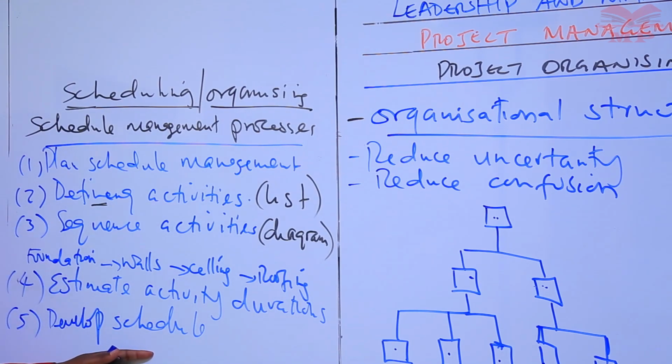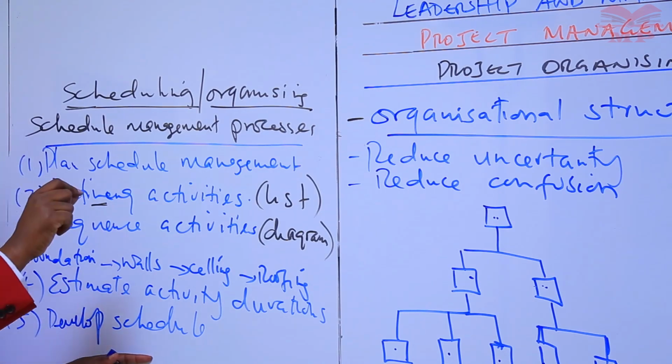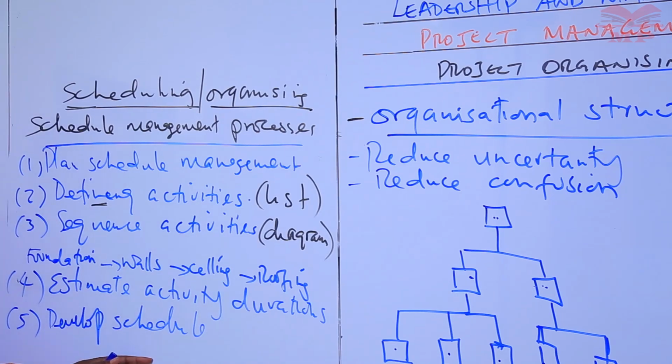And at a minimum, candidates, the project schedule indicates a planned start date and a planned finish date for each activity. And if resource planning is done at an earlier stage, the project schedule remains preliminary until resource assignments have been confirmed and schedule starts and finishes are then established.